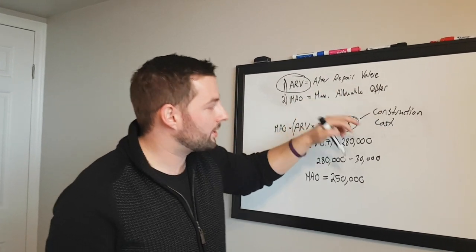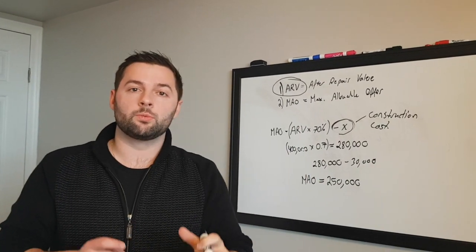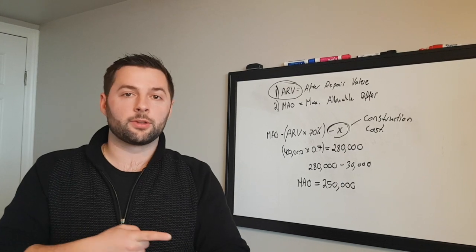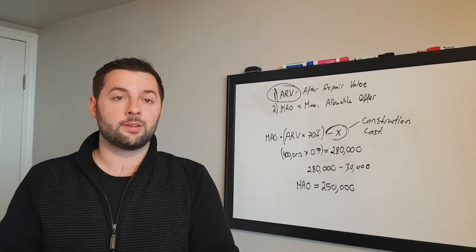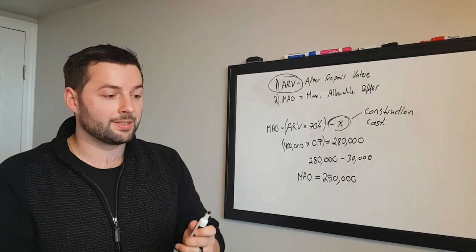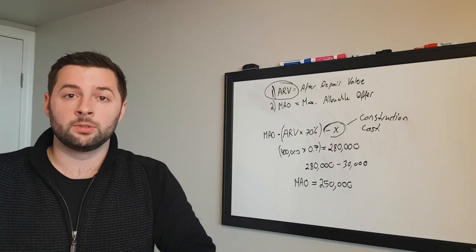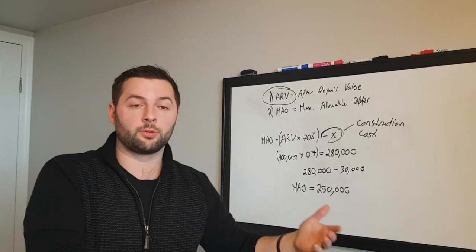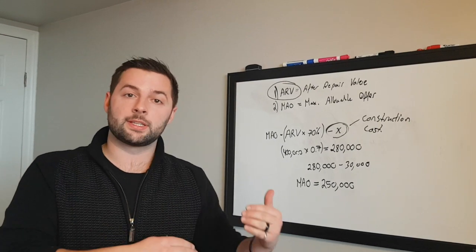Okay, so what you want to make sure is that when you're getting your quotes, they're detailed in what they're going to be performing, how they're going to be doing the work, what they're including in your quote and what they're not. It's very important because sometimes a contractor will say, well, that wasn't necessarily in my quote. I didn't agree to do this part of the work. You have to make sure it's all documented so that you can account for things that need to be done.